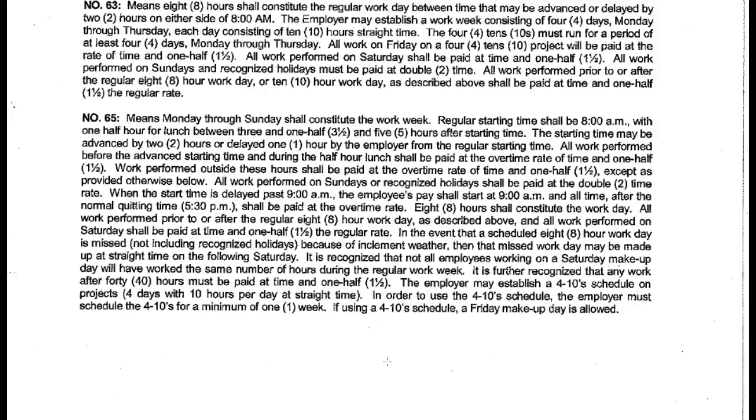And you must schedule, if you're going to use 4-10s, you have to do at least for 1 week. And you can use, if it rains, they're assuming you do Monday through Thursday, and if you have a rain out, you can use Friday as a makeup day. Okay.